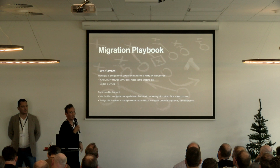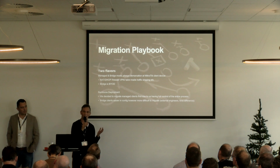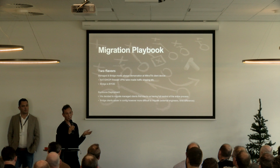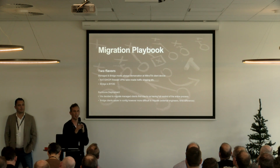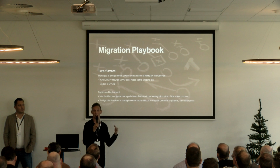And since, like Alex said, there's almost 500 clients which use our services in the World Trade Center, you have to make a decision on which clients to move first. And each configuration comes with its own challenges, let's put it that way. We decided to migrate our managed clients first because we control the entire chain.